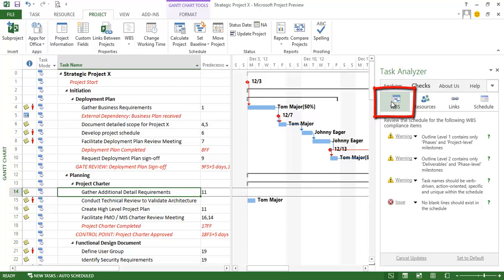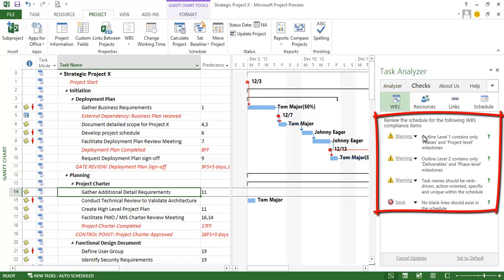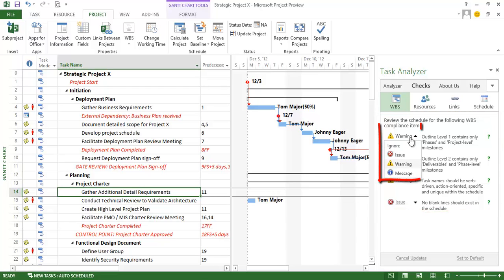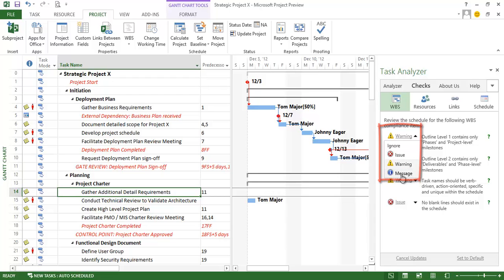They are work breakdown structure checks. Which helps me identify whether something is... Outline level 1 should only be phases and product level milestones. Outline level 2 should only be deliverables and phase level milestones. And so on. And I get to choose the severity of each of these. And I also get to choose whether I want to ignore this particular check. If your organization does not follow this WBS standard, simply ignore this check. Otherwise determine that it's an issue or a warning or a message.